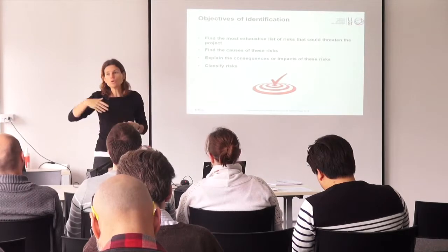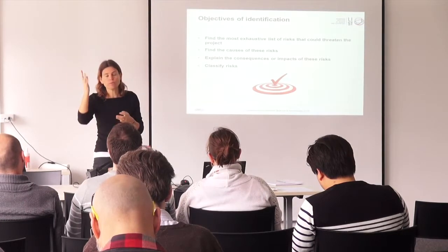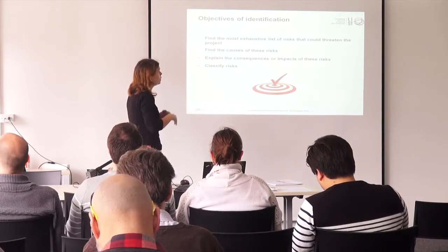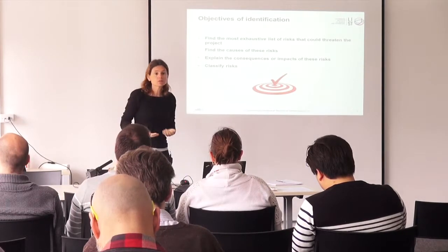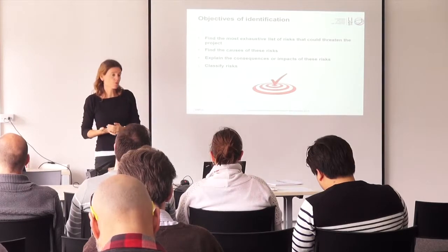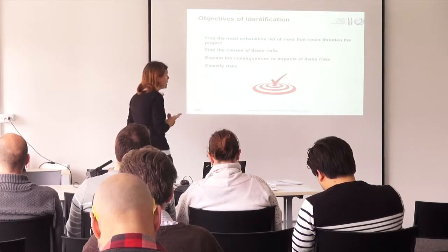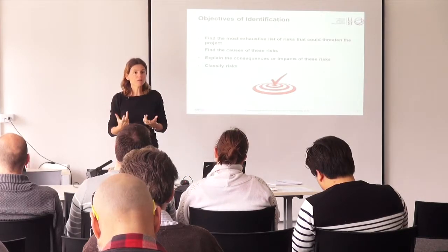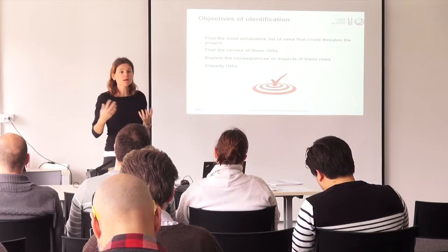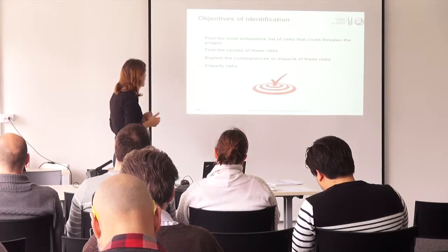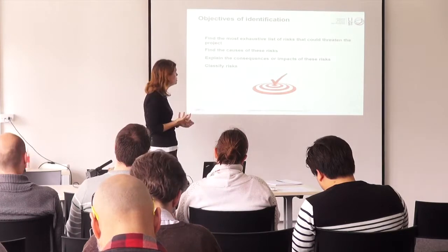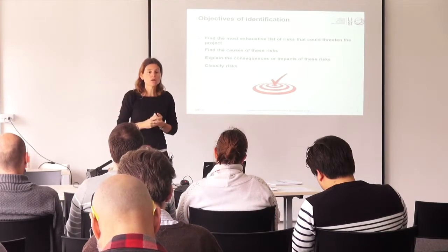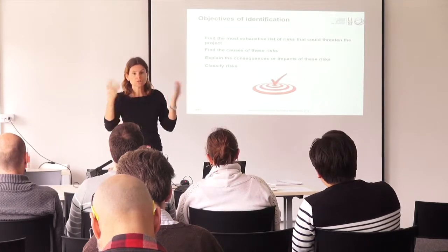Again, do you want to go as far as the plane crashing on the building kind of risk? But what are the main risks that could threaten the goals of your project? And try to find the causes of these risks. Try to define the risk with as many details as possible. Try to explain the consequences, the impact of this risk, and try to do some classification, categorization.